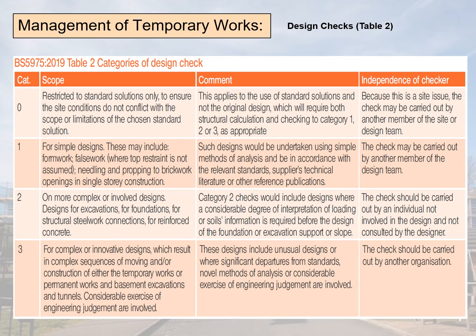More complex designs will fall into Level 3. Design checks will be carried out by an independent organisation with no connection to the original design organisation. This will allow a detailed analysis and feedback of any issues that may be in the original design.